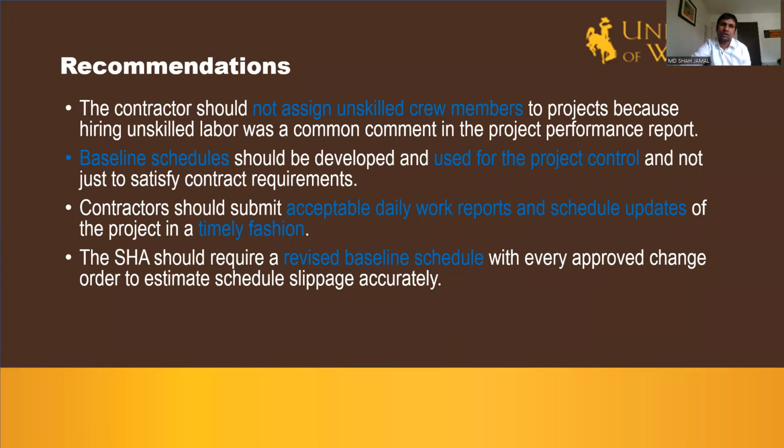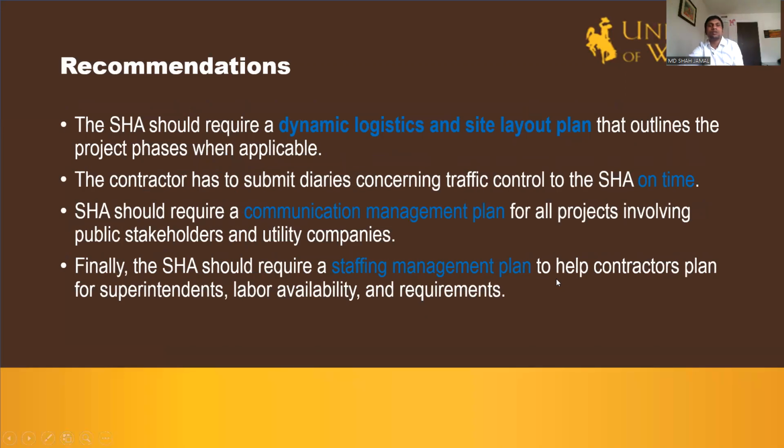Here are the recommendations. The contractor should not assign unskilled crew members to projects, because hiring unskilled labor was a common comment in the project performance reports. Baseline schedules should be developed and used for project control and not just to satisfy contract requirements. Contractors should submit acceptable daily work reports and schedule updates of the project in a timely fashion. The state highway agency should require a revised baseline schedule with every approved change order to estimate schedule slippage accurately. The state highway agency should require a dynamic logistic and site layout plan that outlines project phases when applicable.